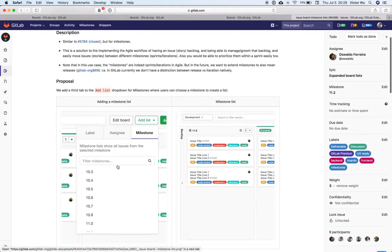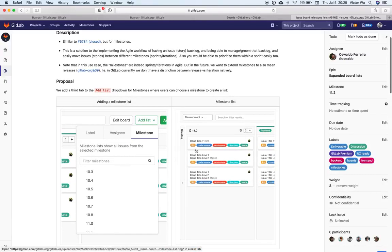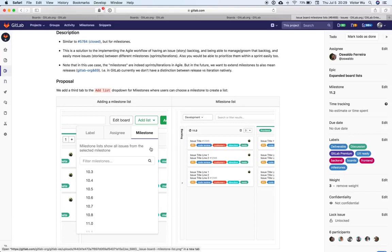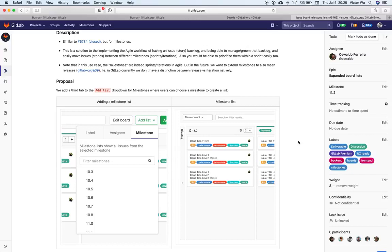And so the reason why we would have milestone lists is that you can drag issues across milestones. And that is precisely a way to do planning across milestones. So if you wanted to have, say, in this example here, this mock-up doesn't show it, but imagine that you have 11.0 here and 11.1 and 11.2, then you can drag issues across milestones. And that's a great way to do planning across different iterations.